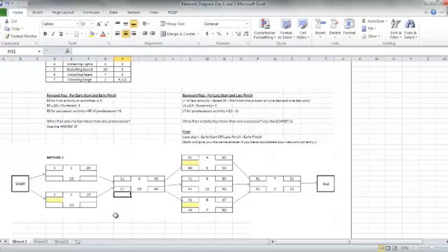Phew. Okay, now back here, I have only one late start to move forward to make it into the late finish, right? So this becomes 20, and this becomes 20. Because remember, the formula for late finish is to take the late start and subtract 1.